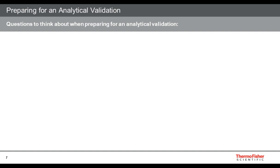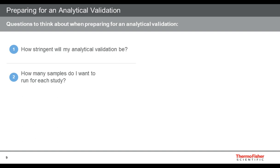Preparing for analytical validation — these are questions we tell customers they need to ask themselves before going into validation, whether or not they're using Thermo Fisher's AV service. The most important question: how stringent will my analytical validation be? Are you going to validate towards New York State Department of Health standards? How many samples do you want to run for each study — stick with the minimum recommendation, or supplement with more samples covering more variants? And what type of sample will you use — validating towards just lung, or a pan-cancer assay pulling in different tumor types?